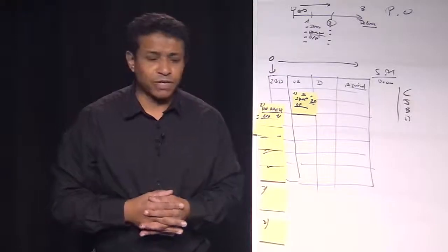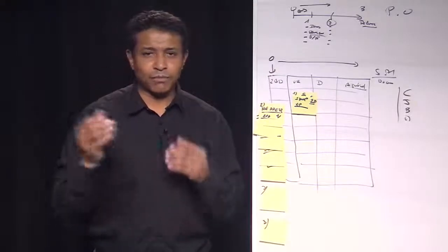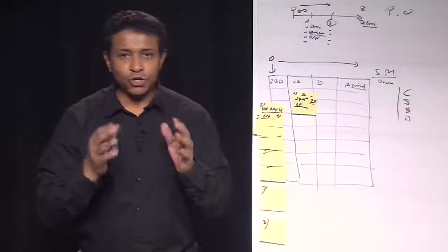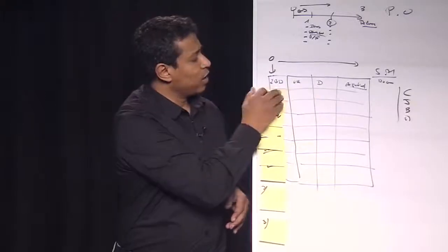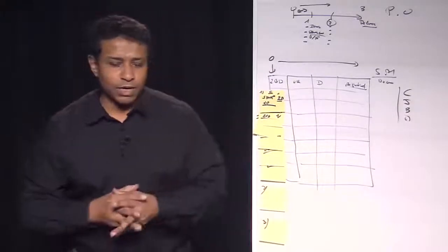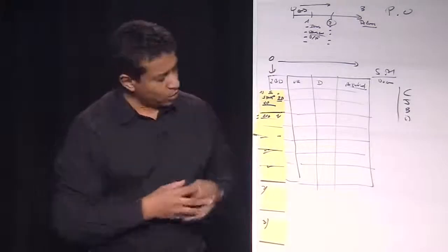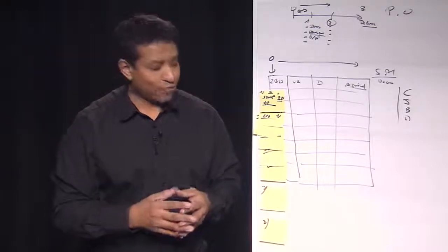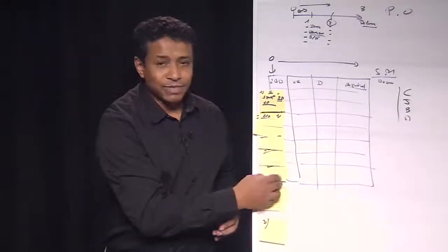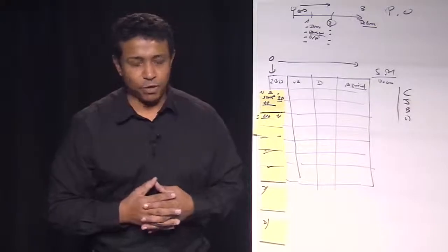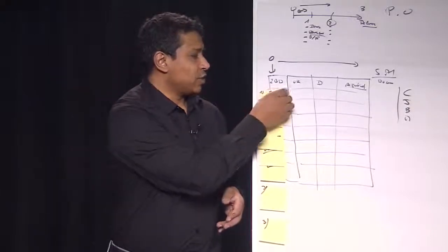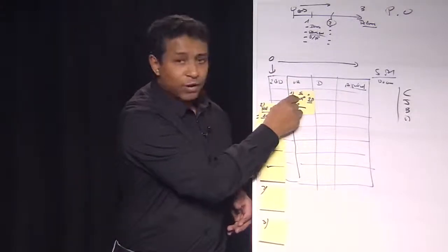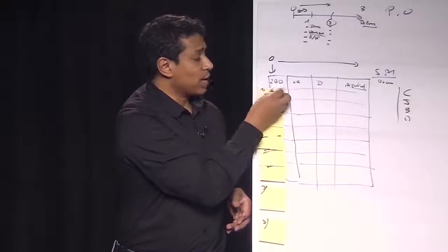We've been discussing this. We made a backlog and we made some priorities. I've filled in a Kanban board so that you know what the priorities are, and we have to be able to make them. So I, the Scrum Master, want all of you to tell me what tasks you think you're able to do, because I've got the duration of all the items, and now I know who does what. So please, when you take a task, you just take it with your hand, you put it on running, and you put your name on it. That's the role of the Scrum Master.